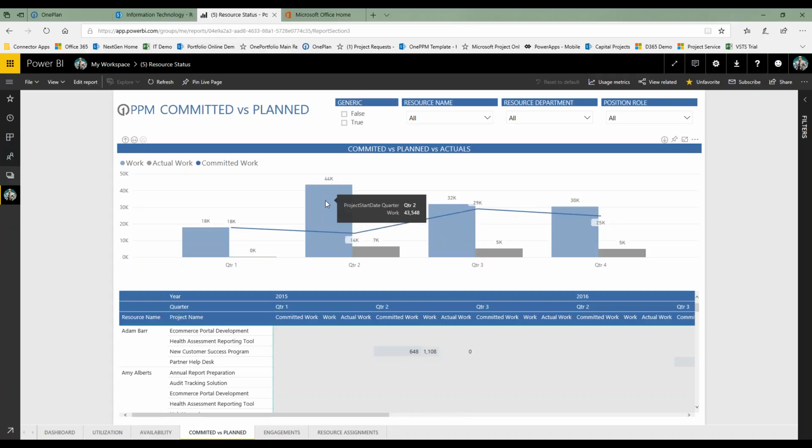The blue bars or columns here represent what the allocations are, based upon the detailed schedule and allocations that we did. Notice in this case, and this is done purposely for demonstration purposes, that our assumptions in the capacity plan were far outstripped by the realities of the detailed planning we did once we got into the individual projects. And then the gray represents what's coming in from the timesheets and what we're actually spending in that particular quarter as we go through.